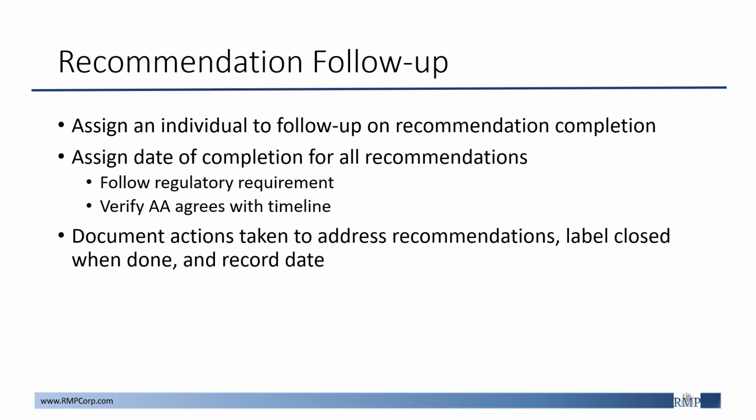Finally, these recommendations should be labeled closed when done, and they should ensure that the completion date and any actions that are associated with these changes to the process are attached. That way, in a paper trail, you're looking at how this recommendation was completed, what were the outcomes, is training involved, all of those aspects are verified and checked and kept together to ensure that from start to finish, following a closure, any types of action items have been closed as well.